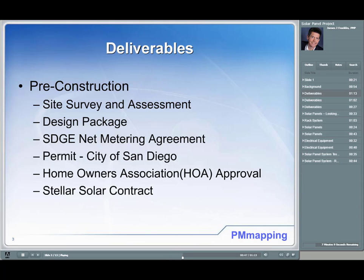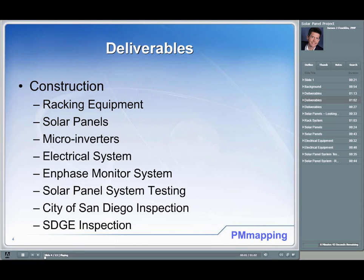We also had to prepare a permit application with the city of San Diego, which included an application form and the design package. I live in an area with an HOA, so we had to prepare a form, get four neighbors to review and approve it, and then get approval from the HOA. Finally, we had a contract with Stellar Solar — the company I went with to install the panels. Construction deliverables included the racking equipment, which is installed on the roof to mount the solar panels.